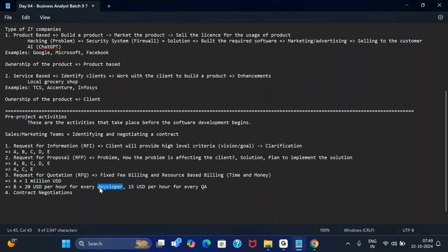So you don't give them an upfront amount but tell them that based on this rate card I will do the billing, and then you can give them a split up of some idea, like let's say, I'll be hiring 20 people, 10 developers, 5 testers, something like that, and those will help me finish up this project. So accordingly they can calculate the rate.